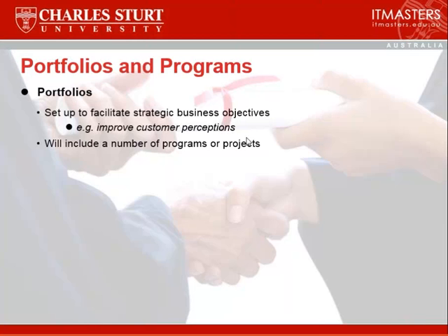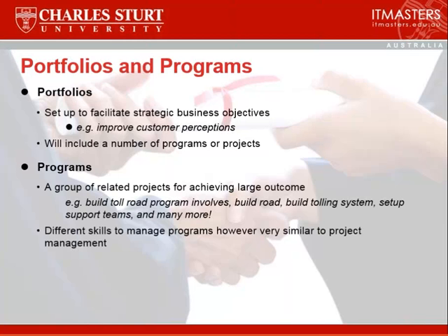Programs. Programs are essentially a collection of projects that are interconnected. So you have a program that will achieve one end result, but you need various projects to undertake that. So it's a group of related projects for achieving a large outcome. For example, it might be a toll road program, which includes building the roads, building tolling systems, setting up support teams, and many other things. Each one of those could be considered a separate project, all within the one program. So you have to have different skills to manage programs, and a lot of these skills are similar to project management skills.